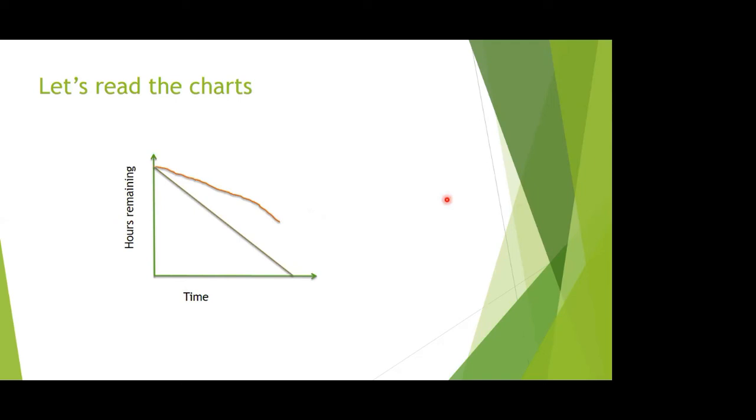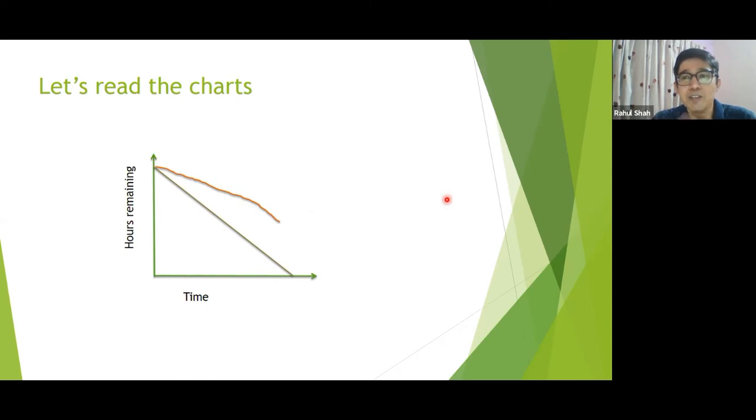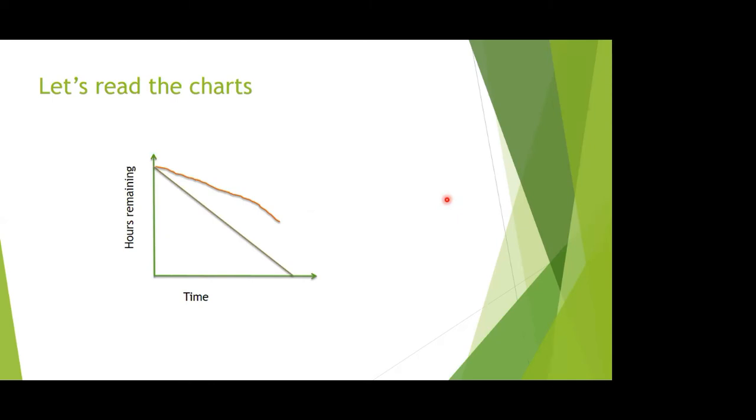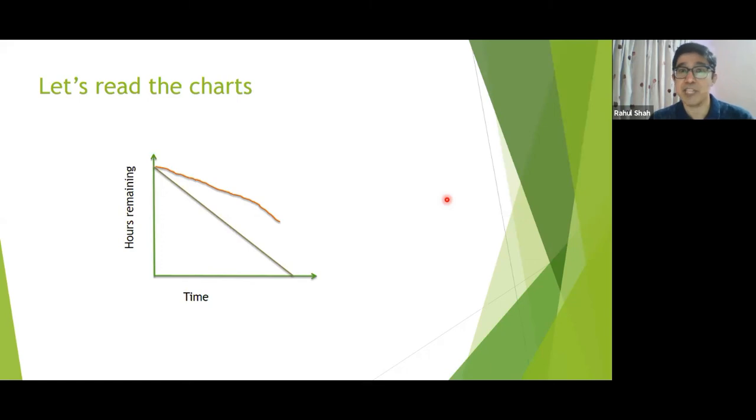So this is beyond the expectation. In the sense, the actual is getting delayed. So this is what we can read from the chart. Now, what do you interpret from this one? It shows that the team was not clear before taking up the task, and during the task they identified that they needed to do something extra. That's why it was taking more time to complete, the scope of work was not clear. Satya, wonderful. Awesome. That could be one of the reasons.